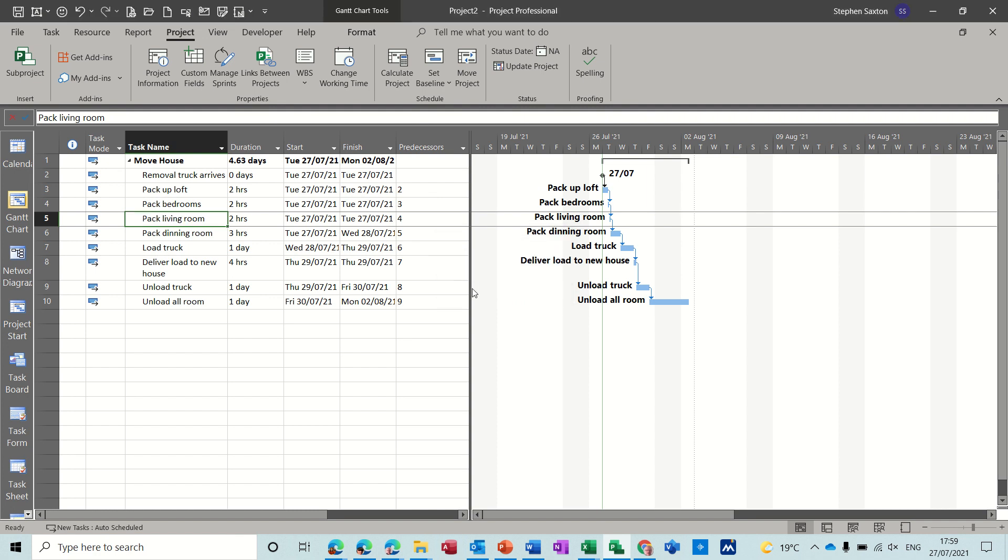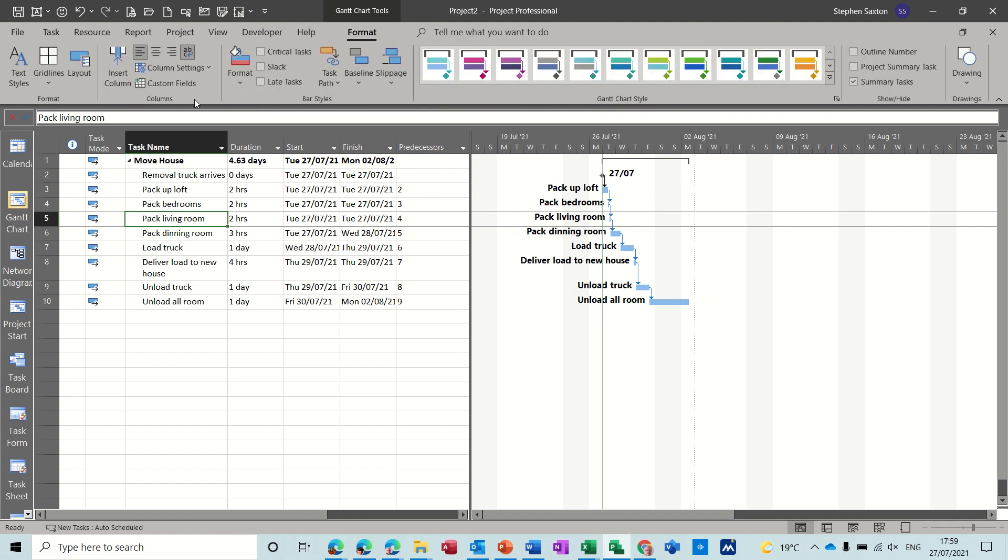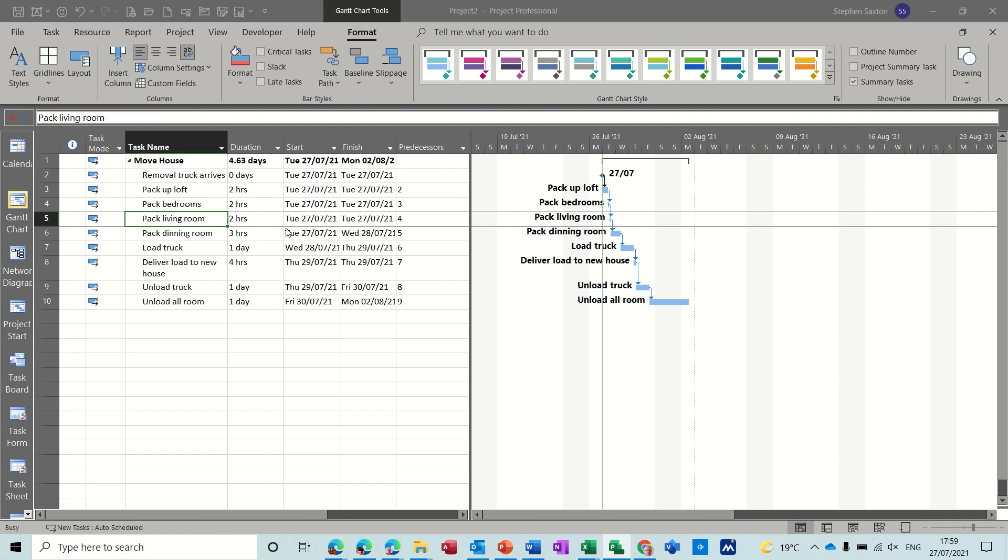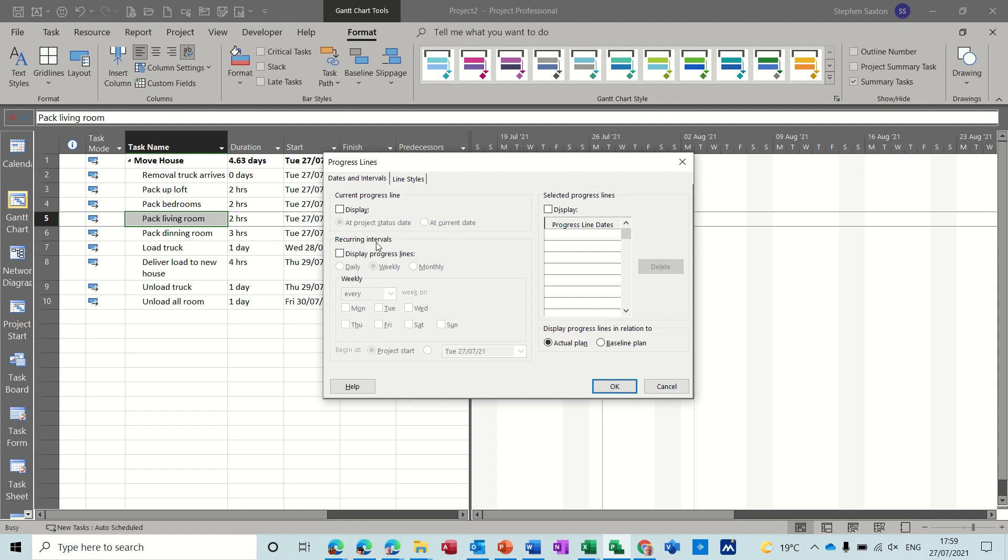Click OK to that. Now what I want to do is put a progress line on to show me how I'm doing based on that status date. So if I go to the format tab I go to grid lines and in there you can see progress lines and then you have some options.